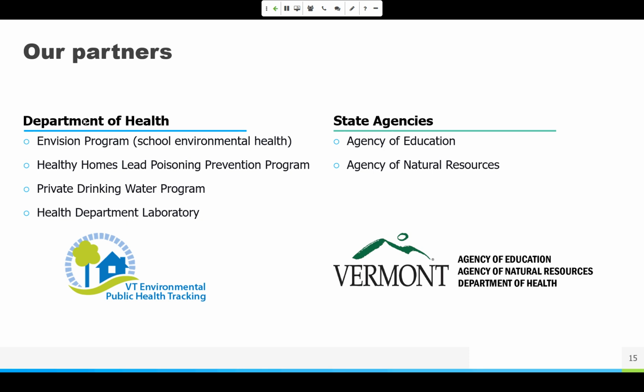Everybody from the program staff level to the division leadership was on board. We were all excited about the goal of the project, and we were all sort of rowing in the same direction. And having that agreement in our motivation really made us a force to be reckoned with, so that when it came time to get our respective administrations to review and approve documents or the next steps of the project, that all happened relatively smoothly. And so that prevented the project from getting drawn out or slowed down, which has tripped up other projects that I've been involved in.